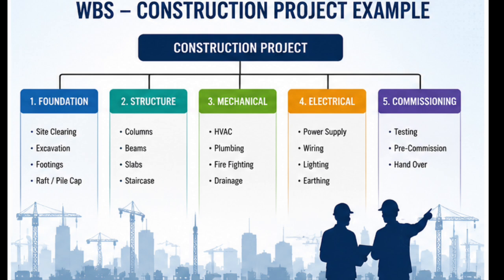Then there will be a pre-commissioning phase in the project. Once the lines are hydro tested, you'll have some pre-commissioning phases where you may be doing water flushing or chemical cleaning and those kinds of activities. It is basically ensuring that the equipment and pipe systems are ready before commissioning.